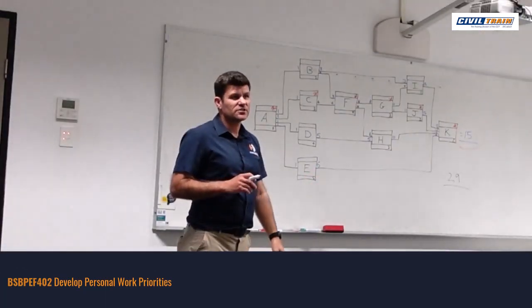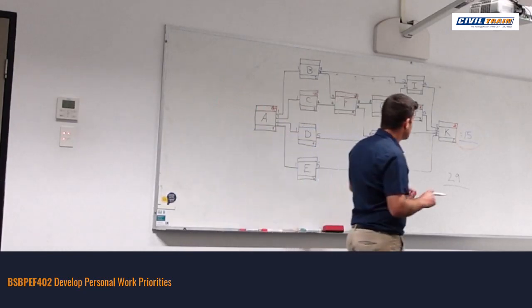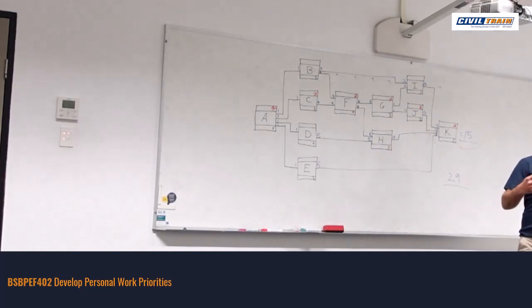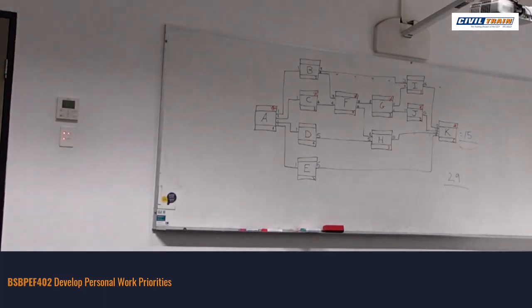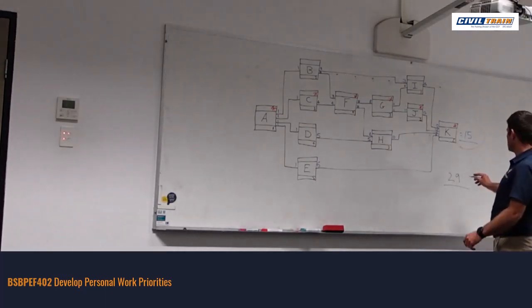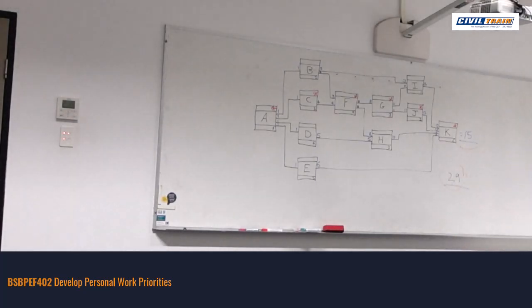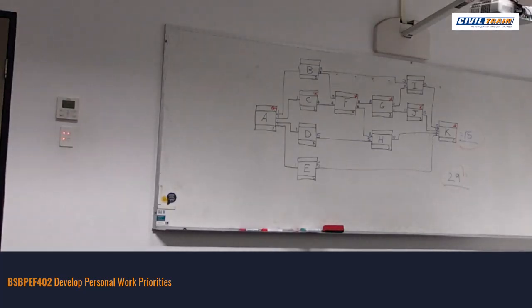Yeah. So a lot of the time, depending on the duration, organisations might put a percentage on, or after, say, every 15 days they might add a day. You know what I mean? So you've got that buffer. We know worst case scenario, 29 days. So it depends on what was quoted or what was tendered for. But it gives you an idea of, potentially behind the scenes, how things might be calculated.